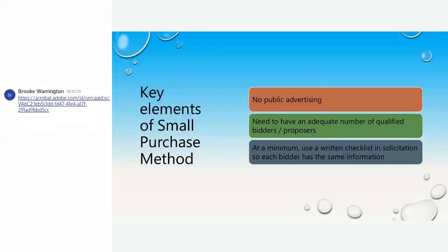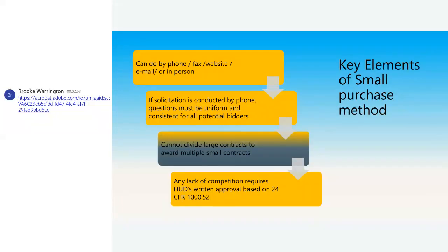As I was talking about, I can't go try to buy a truck. I'd like a 4-wheel drive truck. Next person I talk to, I'd like a 4-wheel drive truck, but let's make it a Dodge. Third person, you throw in a plow package. You can't do that. They're not bidding apples to apples. It's got to be the same thing all the way across the board. If you should decide that you want to change it, you go back and you start over. I'm sorry, we've decided we're going to change that. Please give us another proposal. We'd now like it to be a 4-wheel drive Dodge with a plow package.